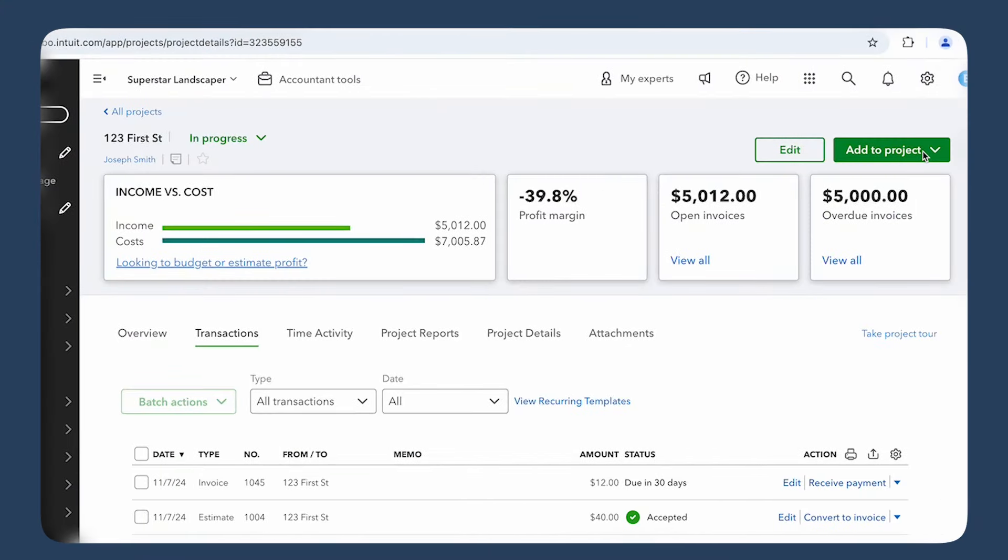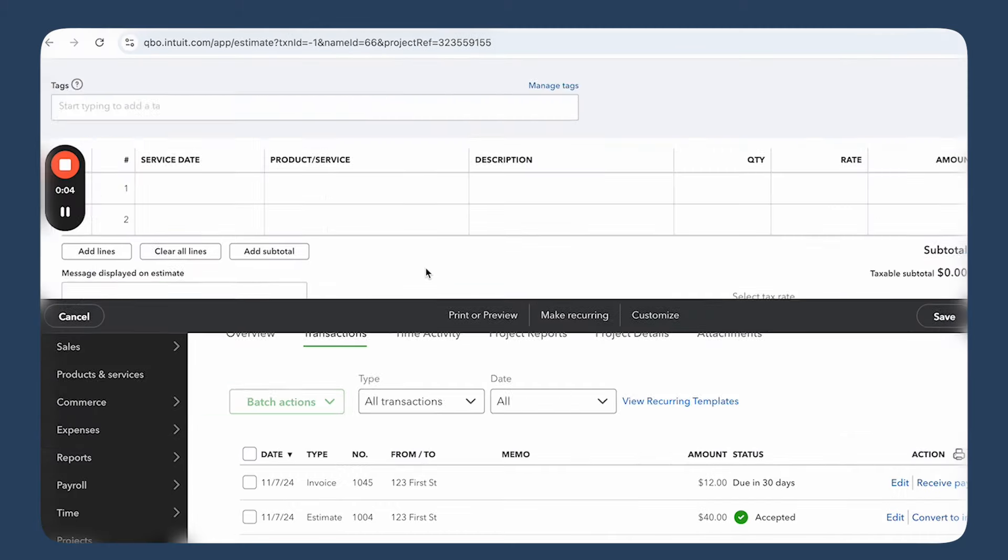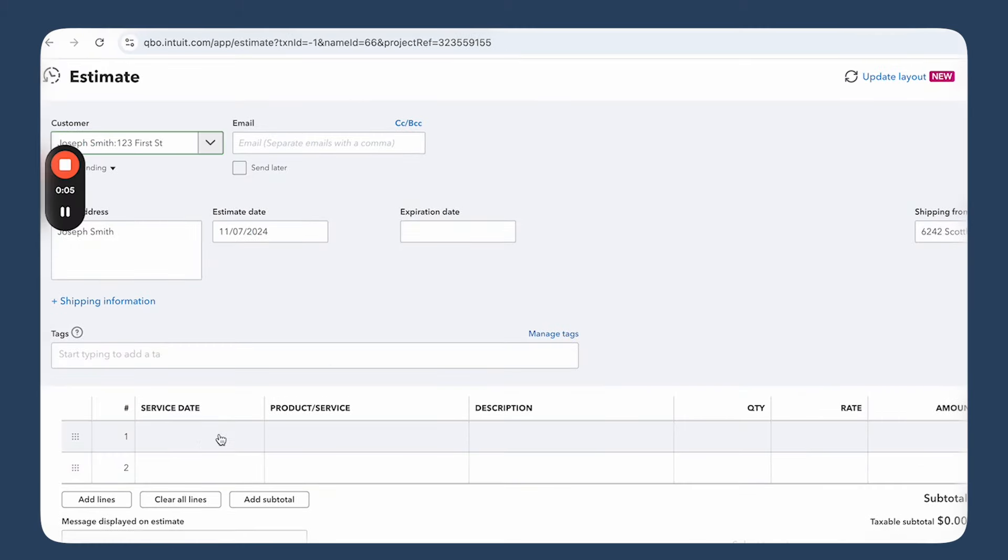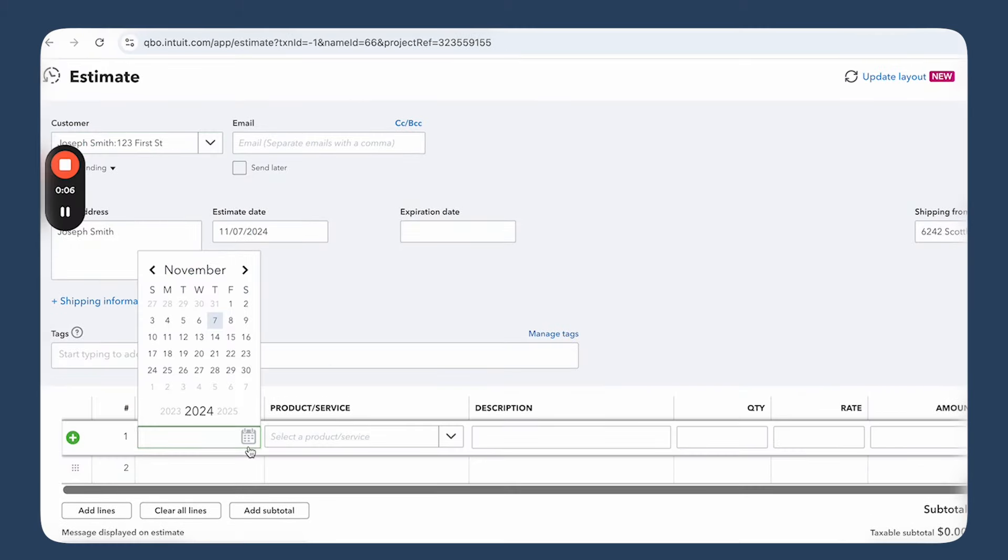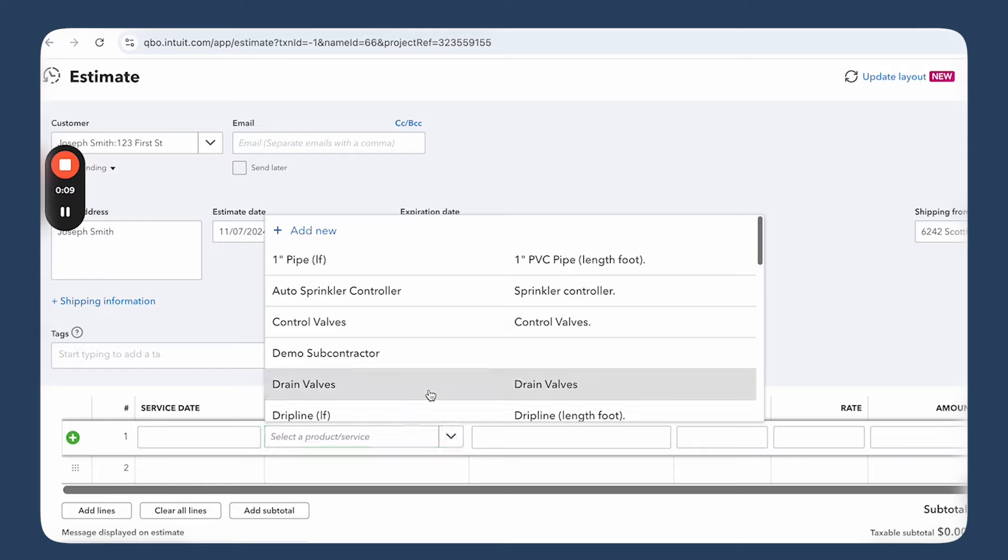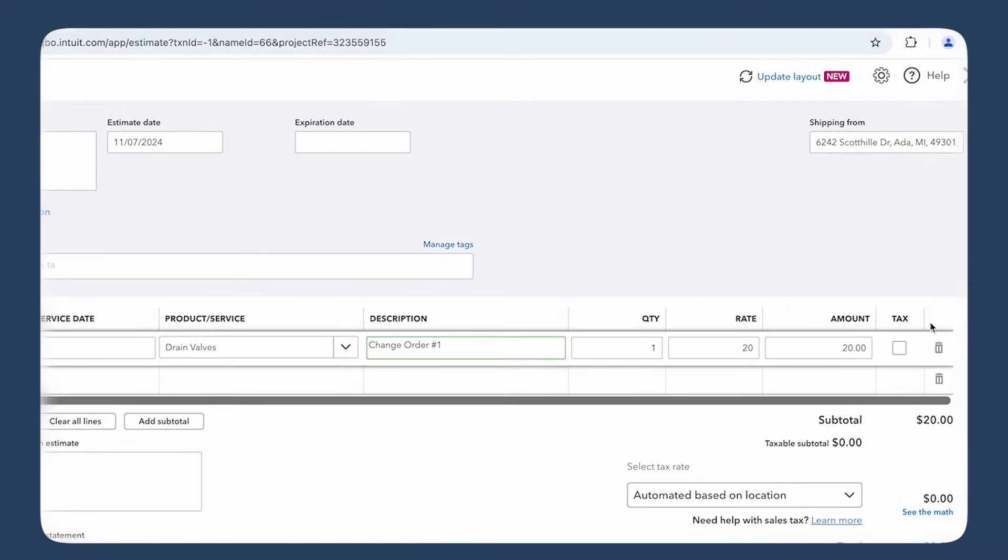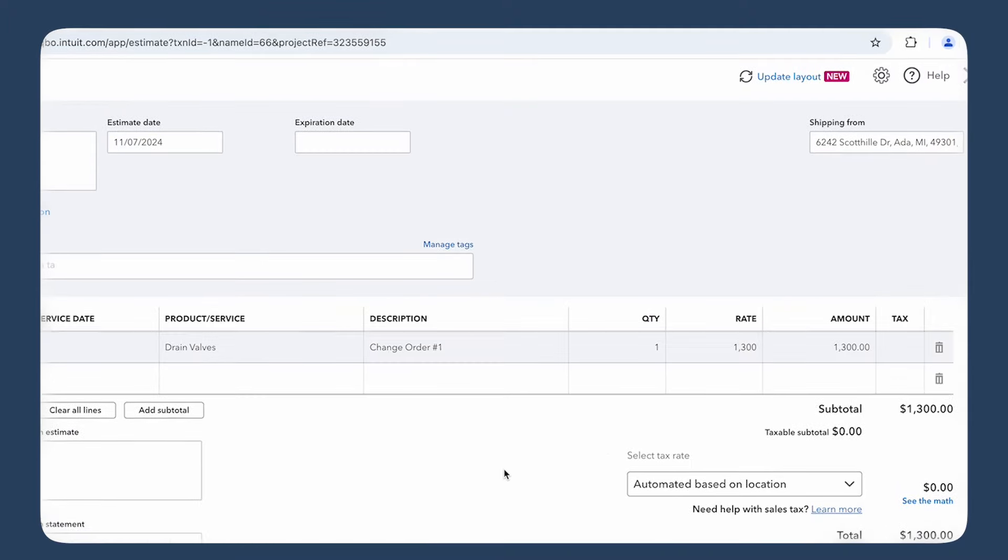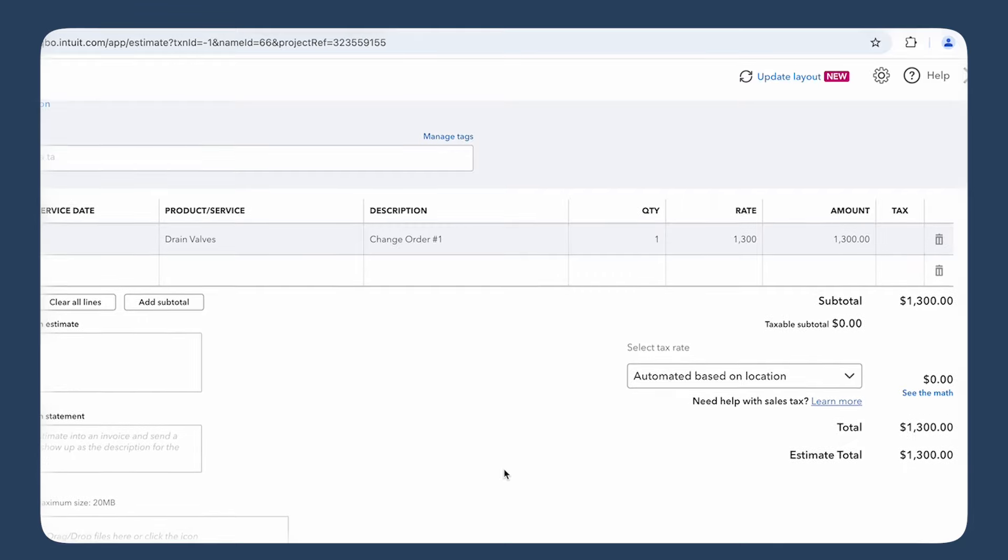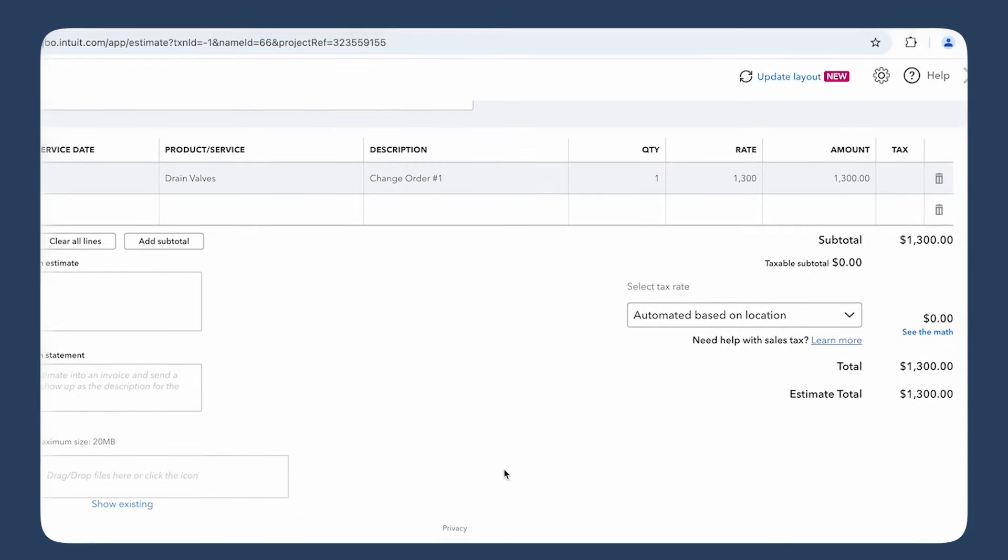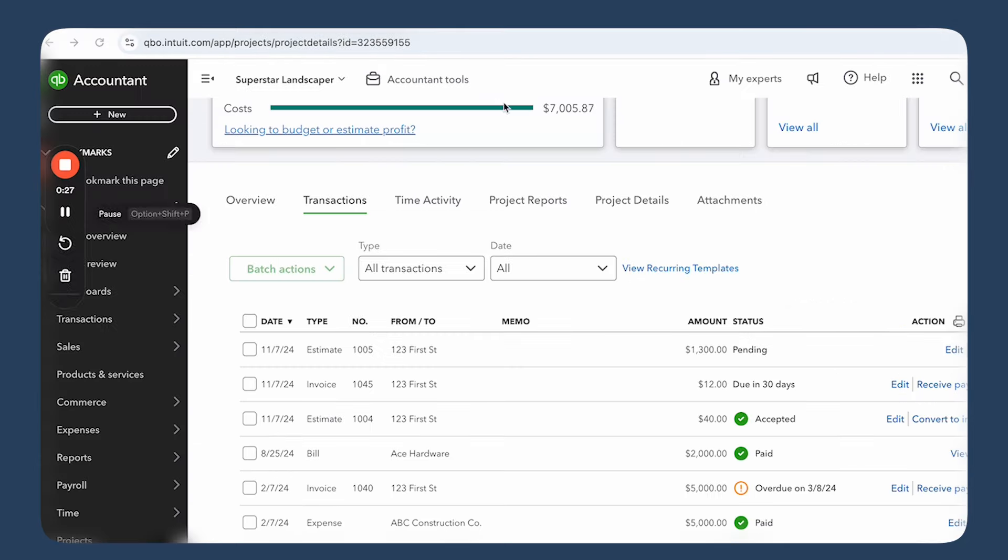There are two ways to handle it in QuickBooks Online. So first, you create another estimate for the project and change the name of it to Change Order Number One, for example. Edit the estimate to include the new items, materials, and labor. Once you've updated the estimate, send it to your client for approval. After your client approves the changes, you're good to go. This updated estimate now includes the change order and you can continue billing for progress as usual.